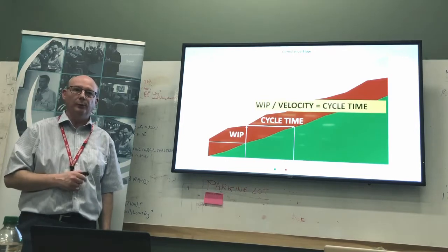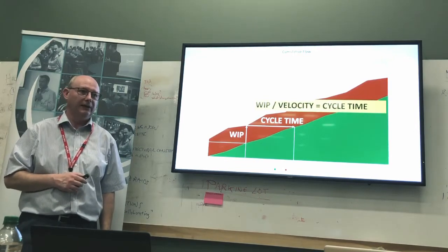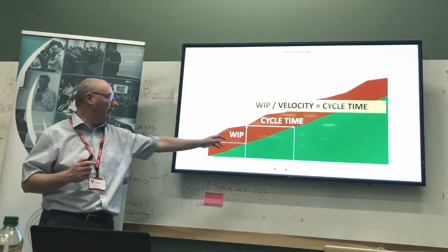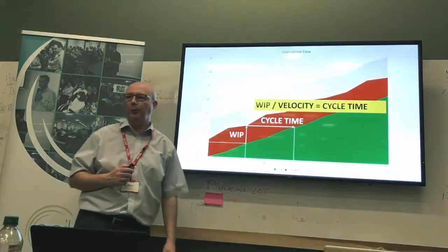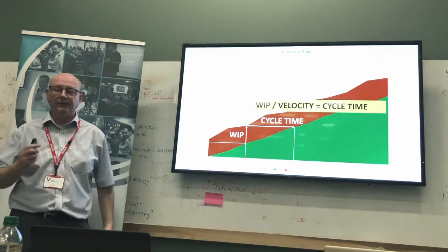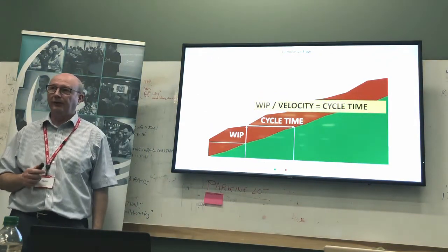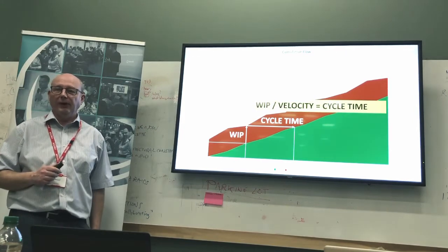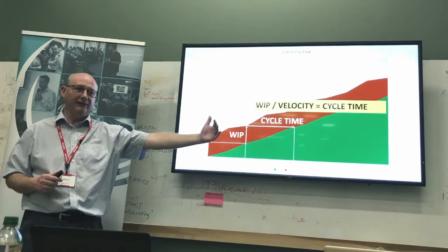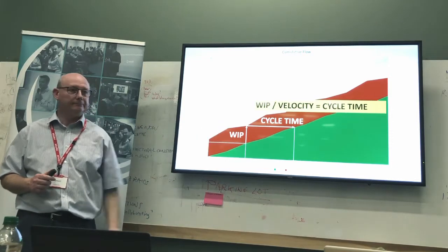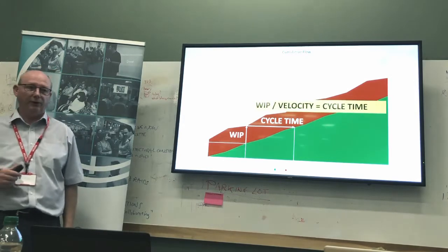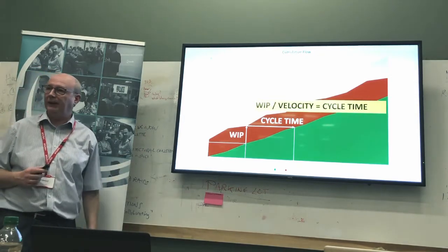Arguably more valuable from the customer's point of view, because here we're just measuring how long it takes to get across our board. Okay, that's interesting to us. But from the customer's point of view, lead time is a more valuable measure because it measures from when you told him you would do it to when you actually delivered it back to him. Yes, that's an important piece of Agile metrics, but that's not quite what we're doing here.